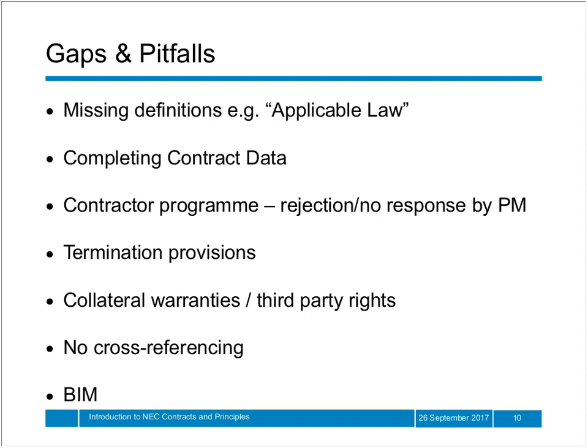But NEC 4 has attempted to remedy this omission by including a new secondary option which specifically supports the use of BIM. Now, this new NEC 4 clause requires the contractor to provide an information execution plan which deals with issues such as the information model, information ownership, and the liability of the parties, which is interesting. We will discuss this, however, in more detail in our next webinar.